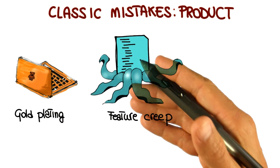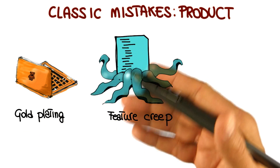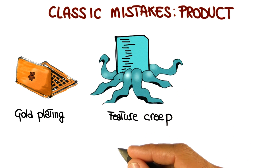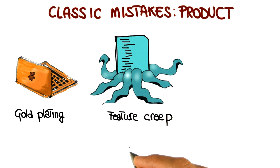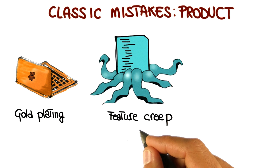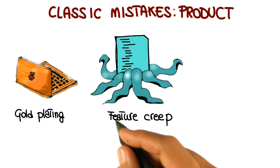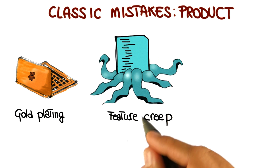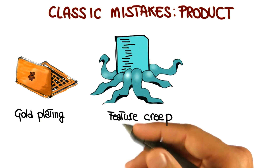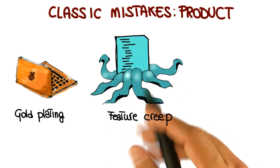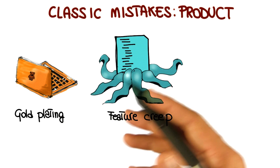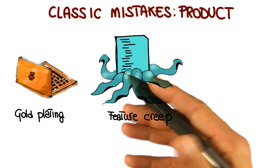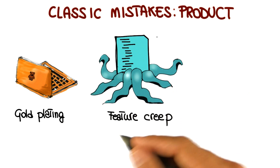Feature creep is another common mistake, and consists in adding more and more features to a product that were not initially planned and are not really needed in most cases. There is evidence that the average project experiences about a 25% growth in the number of features over its lifetime, which can clearly highly affect the project schedule.